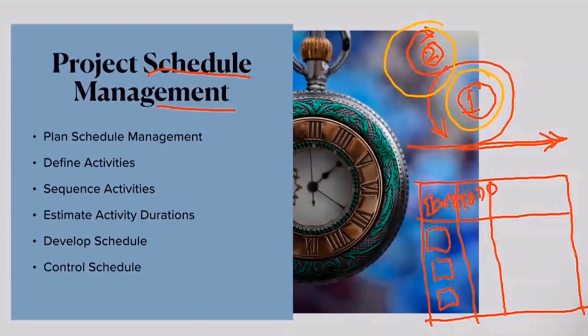So what is this to do? The Scrum Master reviews the list of tasks every day, and then he decides from the backlog, today we are going to do one task. Or if we have 10 tasks, the Scrum Master will decide that we will do 3 tasks today. So from this, the to do is selected at the start of the sprint. When I say sprint, it could be 2 weeks, 3 weeks, 4 weeks, it could even be just 1 week. So it's typically between 1 to 4 weeks sprint. So on the first day of this sprint, he will decide that, okay, for this sprint, we will finish just 10 tasks, right?